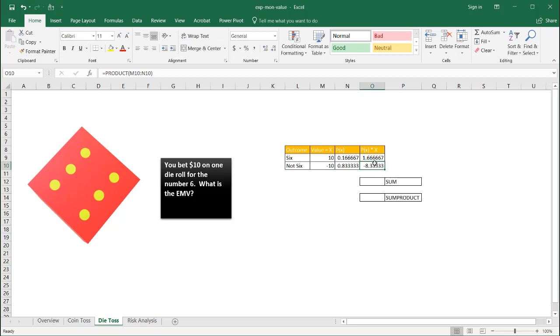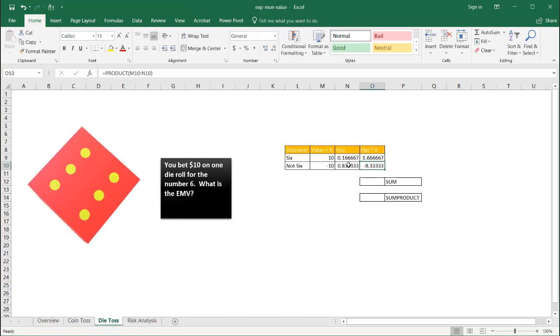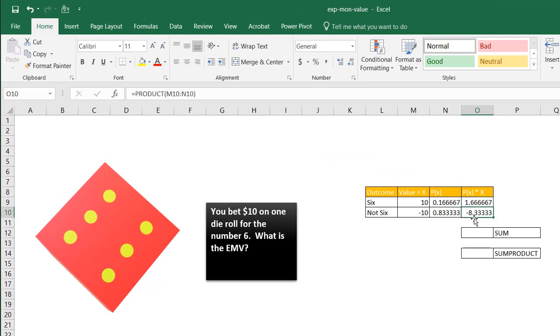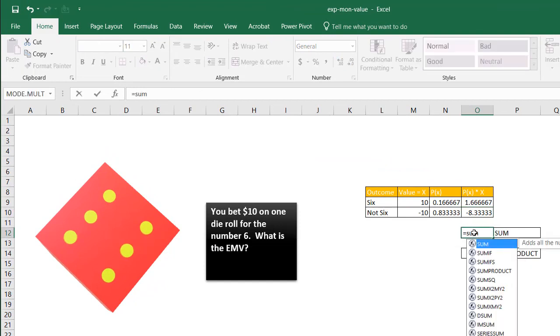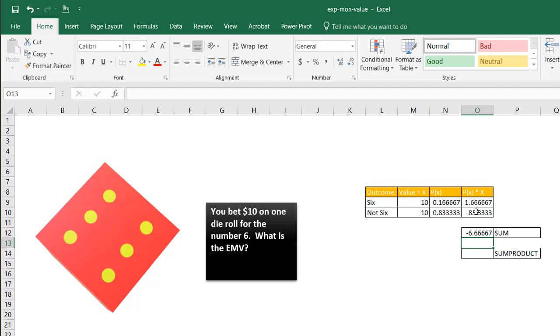So for the multiple, when we have multiple outcomes, what we're going to do is sum the products. So we have our two products here. And we're going to sum it using the sum function, press tab. And our expected monetary value is negative 6.7.